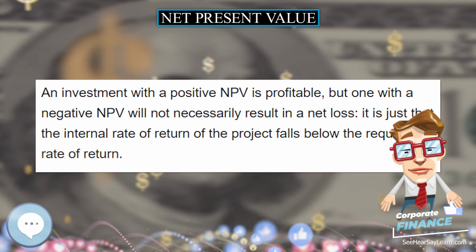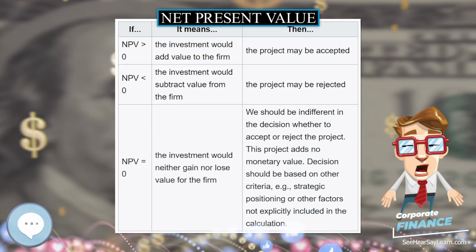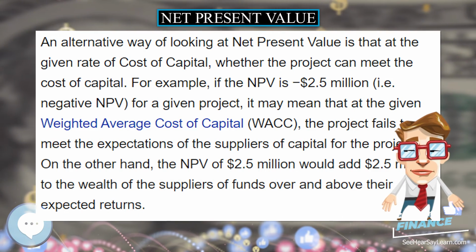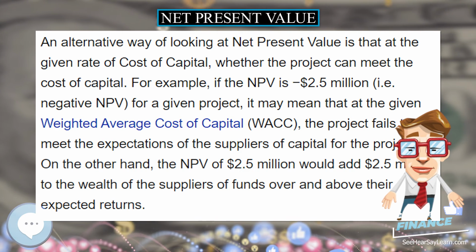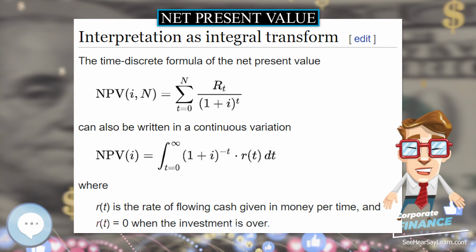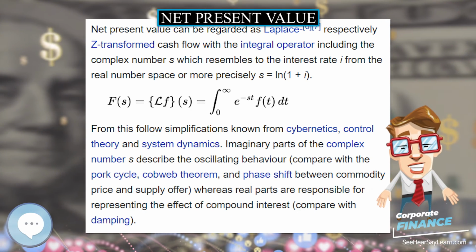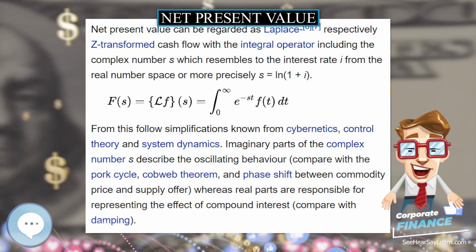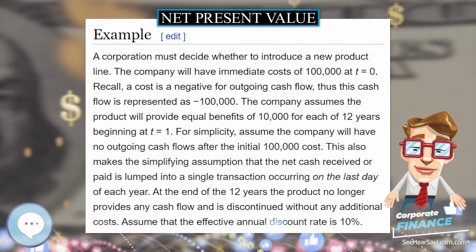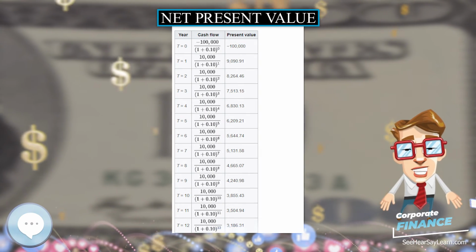More realistic problems would also need to consider other factors, generally including smaller time buckets, the calculation of taxes, including the cash flow timing, inflation, currency exchange fluctuations, hedged or unhedged commodity costs, risks of technical obsolescence, potential future competitive factors, uneven or unpredictable cash flows, and a more realistic salvage value assumption, as well as many others.